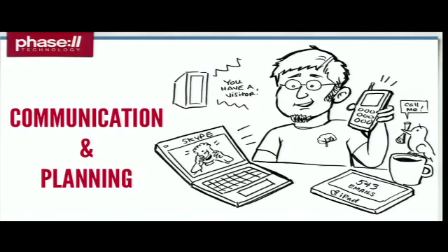Now, in a lot of cases, projects in the beginning tend to become a bit of a mess communications-wise. The first 20 to 40% of a project is where the vast majority of the miscommunication occurs, and that's incredibly important, because if you end up with the wrong people talking to the wrong people in the beginning and you allow that process to stick throughout, you're going to end up with too many communication channels that potentially don't keep the project going in the right direction. So how do you do it?